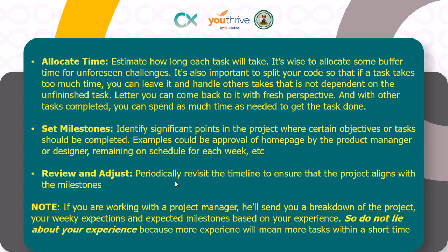So in my scenario, because I had the time, I said let me do it serially. But if I was under intense pressure to finish and submit the job, the date pop-up was independent, so other parts of the project did not depend on it. So I would have left that one and finished the other parts, then later I can come back. And that is the suggestion here.